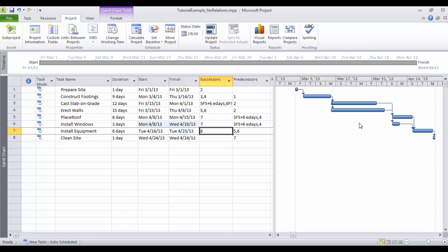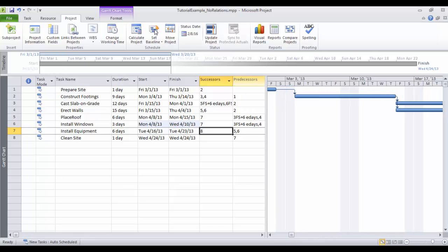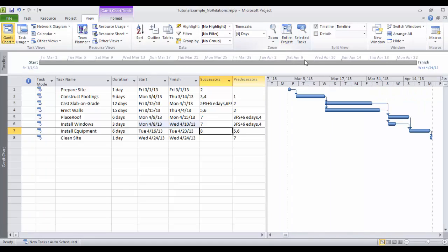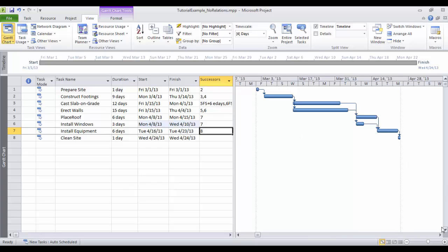The other very important thing, related to appearance also, but which delivers a lot of information, is the critical path. If you go back to the lectures on scheduling, a critical activity is one that has 0 float. You cannot afford any delay in it because simply it will mean a delay in the whole project. So what we will do now is go back to the view, entire project, and show it. I'll just squeeze this here, entire project, and let's zoom in.